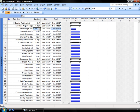And if I include that in there, you'll see how that decreases the line of the Gantt of that particular bar. So you can now tell that I could have perhaps one or two of these smaller steps occurring at the same time if they are less than one day in length.